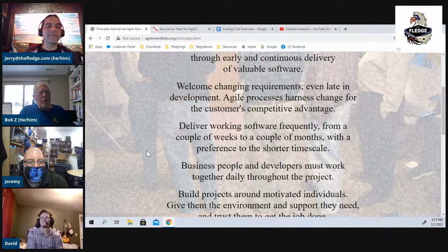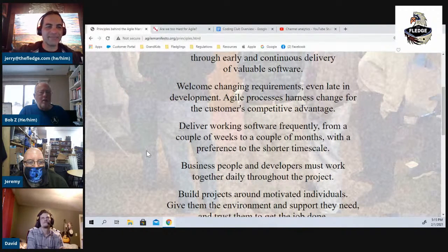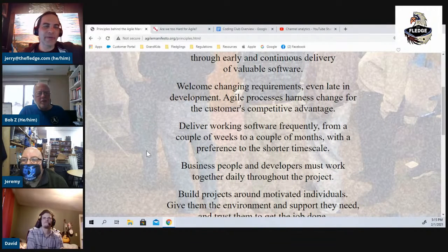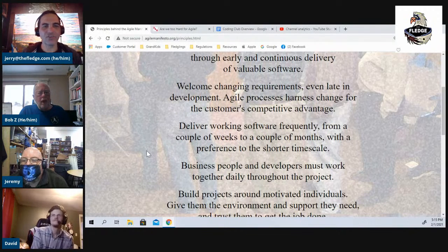Right. So in cascading models or waterfall models, you have change control. And that's where the managers go fight about cost and timing and commitments to the customer and all that. And it brings the contracts in. And it's actually change avoidance. It's doing everything possible to make sure you don't change anything. So now the customer, again, needs that change to really function in the future that he's now in, a year after we predicted what his requirements might be. And again, screwing the user.